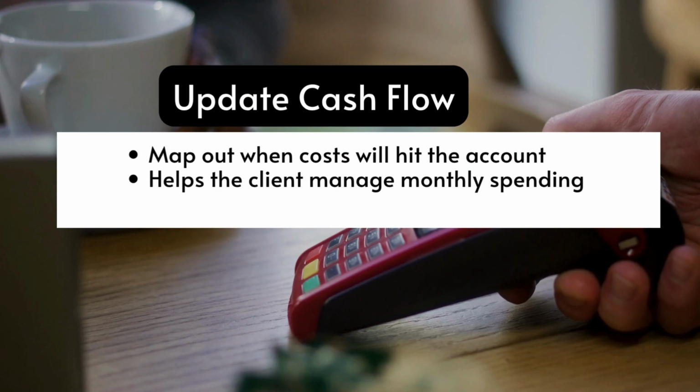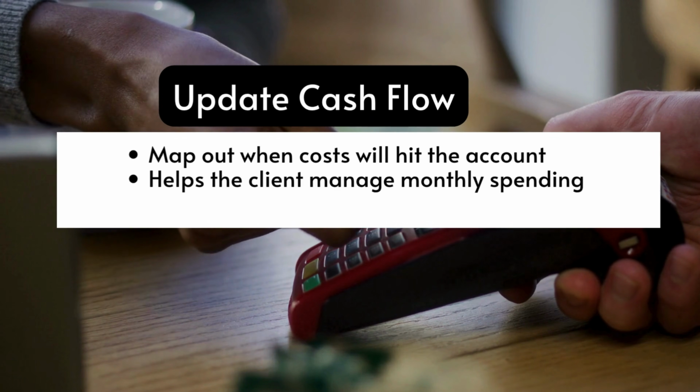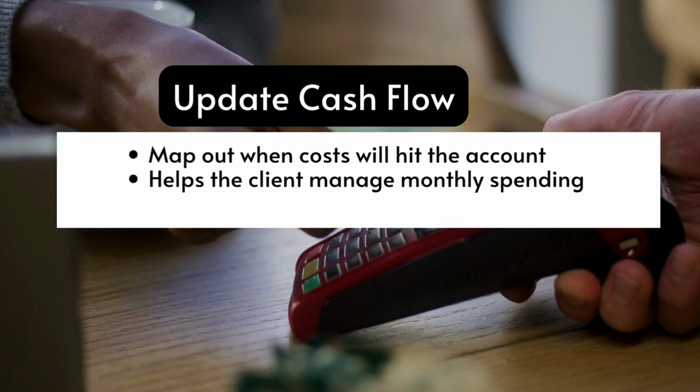And then there's cash flow tracking, like I mentioned earlier. This is where you map out when payments are expected. This is where you'll have your monthly figures. Usually you can ask the contractor for their cash flow, but you can also have your own as a QS, where you realize that the trend is like this. You look at the changes that are coming through, all the accruals, all the pending costs. Then you're like, okay, next month this is what we're going to pay you.